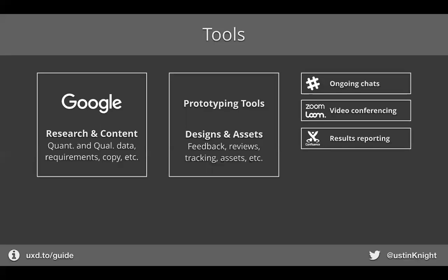And then we report all of our results in an internal wiki or an intranet that we've built using Atlas and Confluence. So whenever a project happens, we'll document everything that we learned from it, our successes, our failures, and the results that came from that, and basically create a case study that is then published internally at HubSpot. And we can use that to go back and reference things that we've done in the past, or also to help inform the rest of the company, since we're a fairly large organization now, what's happening within our team.